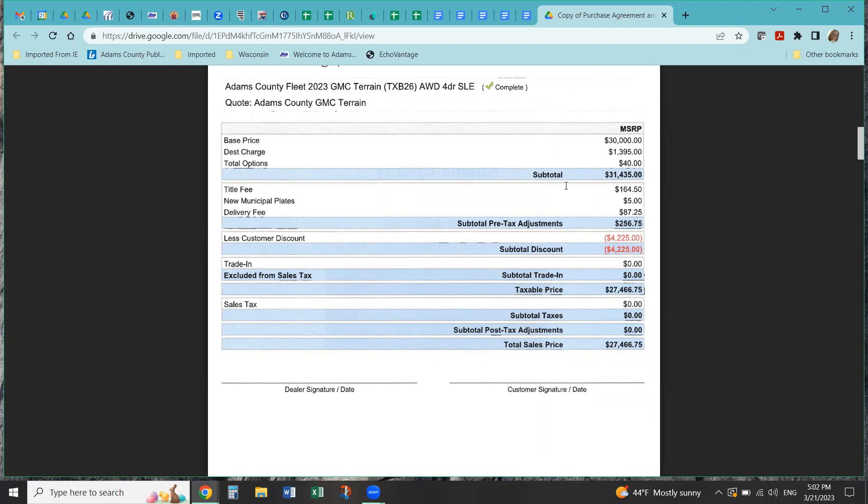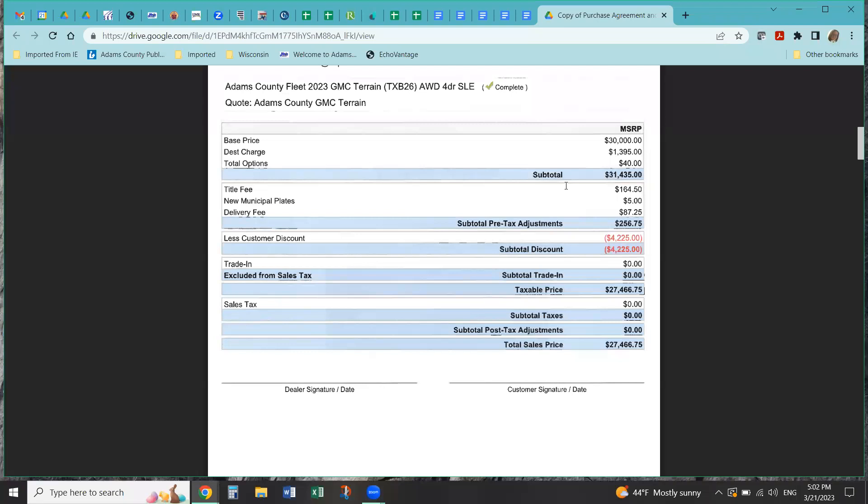We had budgeted $220,000 for vehicles, and purchasing the GMC terrains would be just under that $220,000 amount. And I think the plan is, then we would get rid of three Malibus. That accurate, Kelly? We would keep two Malibus and leave for us. Does anyone have any questions? Yeah. How much of these over budget? Well, so in the budget, we were going to purchase 10 vehicles for $22,000. So they're about $5,000 over what we had initially estimated to a vehicle. So we brought it down to purchasing eight of them rather than 10. Yeah. And eight are sufficient.